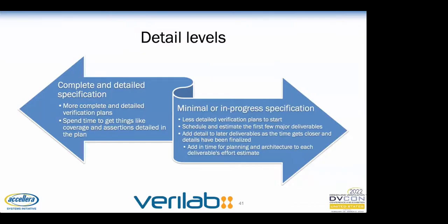On other projects, verification effort has to get started before major features, let alone details, have been solidified. For these kinds of projects, we can work out the detailed plan for each deliverable as we begin to work on it, sort of a just-in-time scheduling. This flow will work at either end or anywhere along this spectrum.